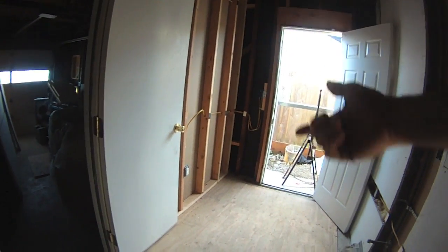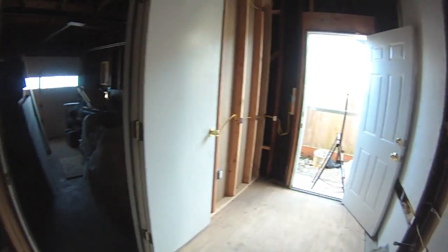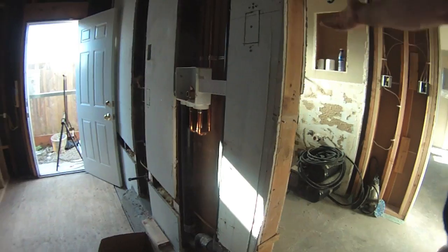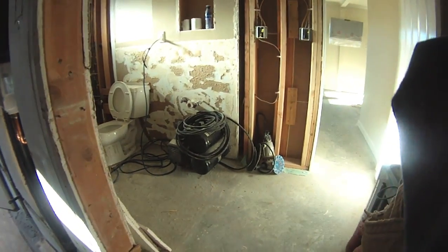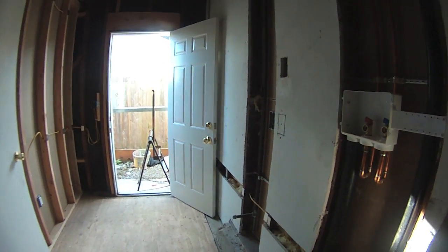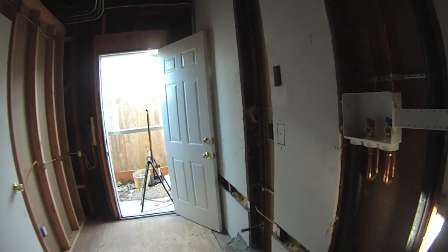The carpet was delayed. The carpet went in January 11th. The movers came January 13th, and he spent his first night in this house since he bought it on Friday, January 13th, and everybody's happy. Everybody's extremely happy. It wasn't absolutely ready to go, but it was livable for him. The master bathroom was really the only part of the living space that was not immediately livable, and that was because we were waiting for that damn plumber. See on that video there, the plumber hadn't been there to do the shower valve. I couldn't build the shower enclosure without the shower valve soldered in.